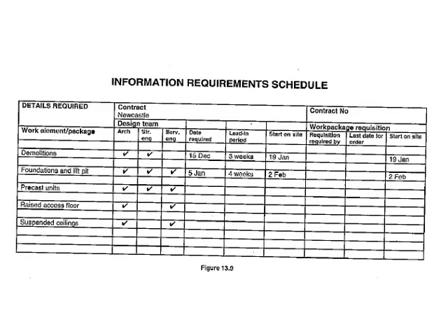Okay, information required. The next few slides are just an example of your basic request for information. So this is just a summary sheet which shows us which items were requested, from whom, requested on which date, what lead time, when did you give it out, the question, and when you actually received it. Okay, and when you want to start on site. So the date required, you require the information by the 15th and start on that date.